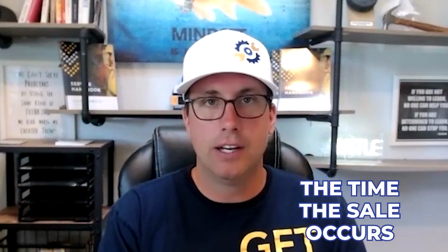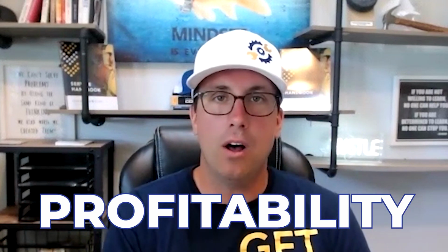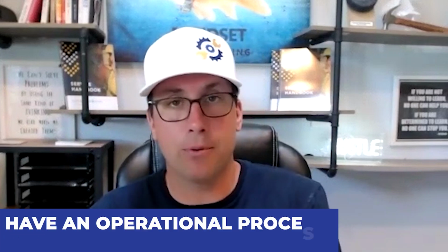Now, I'm going to stay specifically on operations, because what happens from the time a sale occurs to the time the job gets invoiced is all of your profitability. How well did the salesman communicate what the expectations of the client are? Because if he wants you to call 2 days before and you do not call 2 days before, and then you show up and he denies you, guess what? You just lost money. You just lost all of your travel time and setup time, because he denied you access to the building since you did not have a good operational process. Everybody here is probably raising their hands saying, yeah, I've been through that. Well, learn from it. Have an operational process.